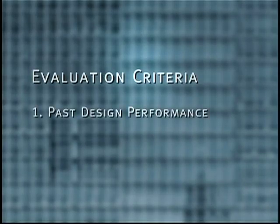Your evaluation and selection will be based on 3 factors. 1, past design performance of the lead designer and his or her design firm. The lead designer has submitted up to 3 projects completed within the last 10 years. The design firm has submitted 5 projects. Stage 1 portfolio submission should really demonstrate how thoughtful and creative the architects are in solving their clients' problems. You should be able to see how the solutions specifically address that client's problems.